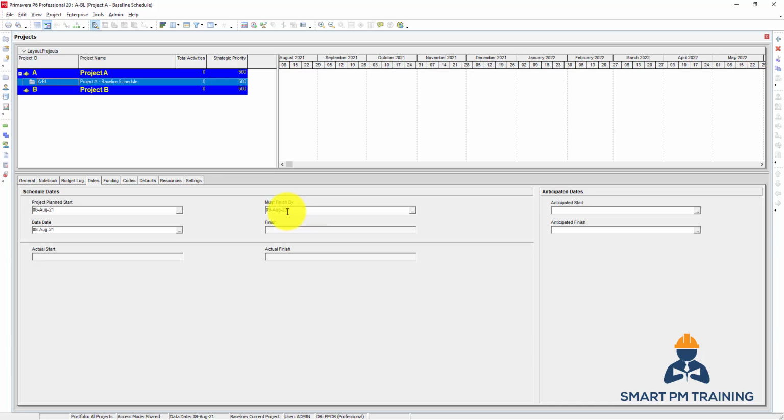So you must finish by 1 day after. So here the Primavera will recognize that you are running the program 9th of August, 7 a.m., which means all the work or the planned work that took place on 8th of August 2023 is already taken into consideration. So this is very, very important. So you have to make sure it is 1 day after the project completion.